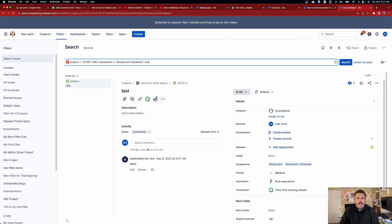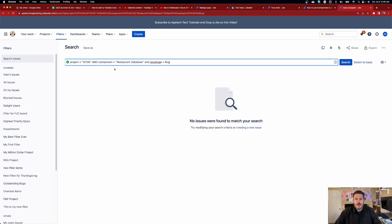The other way I use components is when looking at bugs. When you're getting ready to deploy your application to a customer, you may run into things that aren't working, and a bug can be anywhere. When you classify your bugs into each system they belong to, it becomes more structured and organized — you can figure out where to send the troops, which system has the most bugs, and how to solve those problems. You can click on a component and add an issue type filter for bugs to get a laundry list of all bugs for that particular system, then assemble your team to put out that fire.